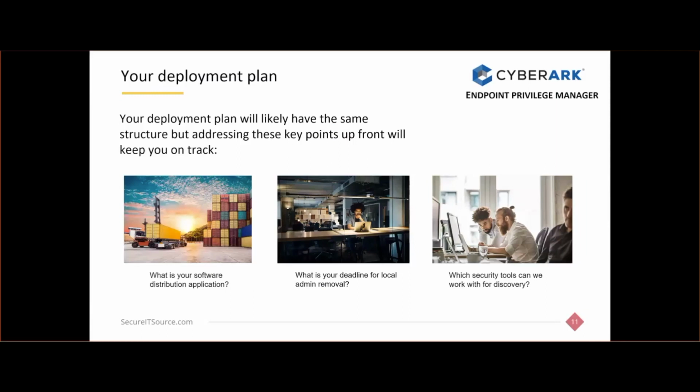Some folks that we've worked with in the past have used a Microsoft Ring strategy, in which we'll work with our internal IT teams before we expand the scope of the application. I love the product EPM simply because we can push it in a way that we're not highly impacting the environment, we're not highly impacting work, and we can scale. All right, so we can essentially mold your deployment plan in accordance to your own deadlines for certain things that need to get done.